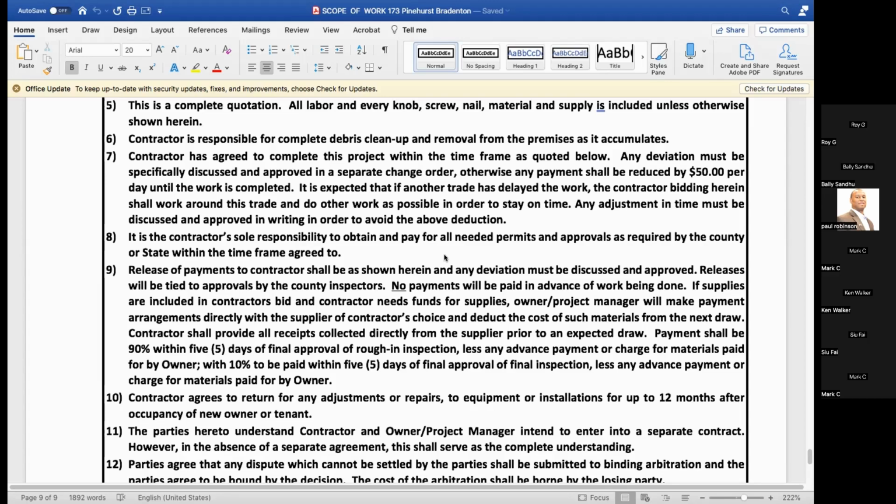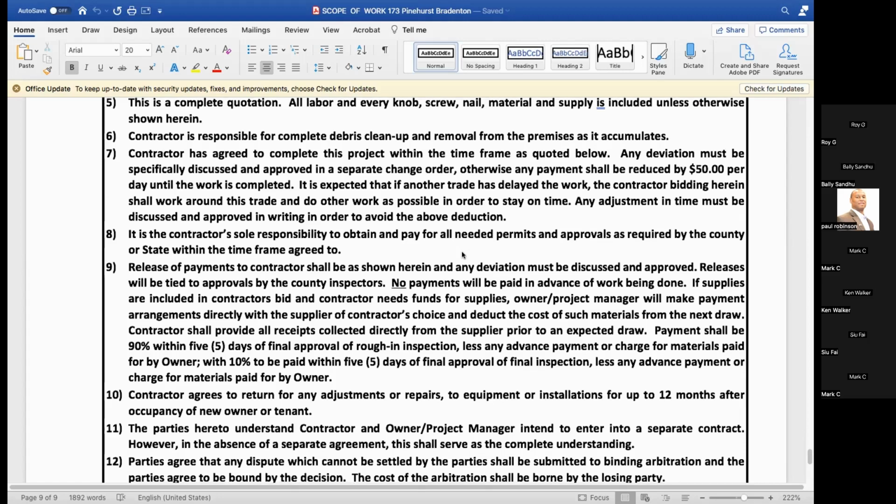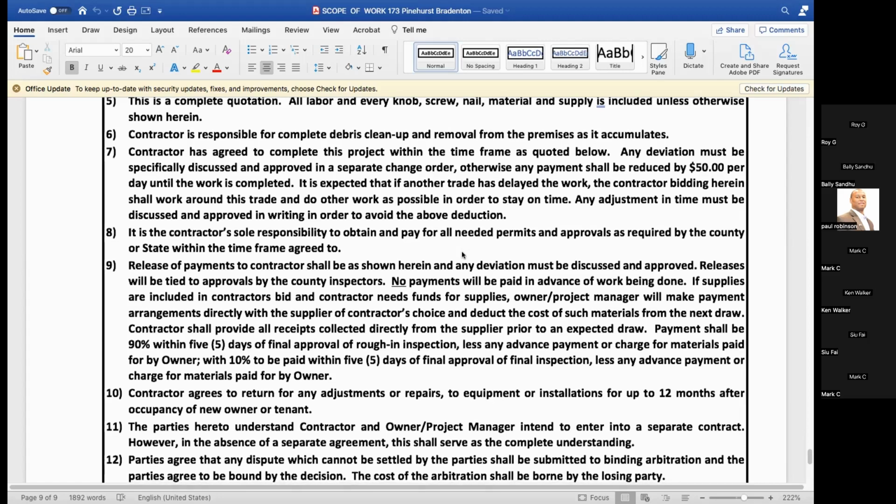And with a rental, if it's supposed to be done by, say, March 20th, and you're going to have a new renter in there April 1st, and they don't get done till April 15th, you've lost that renter and you've lost rent. And then up north, there are certain times of year where houses sell better, like in the late summer, early fall, because people want to be in their houses for their kids to start school in the new year.